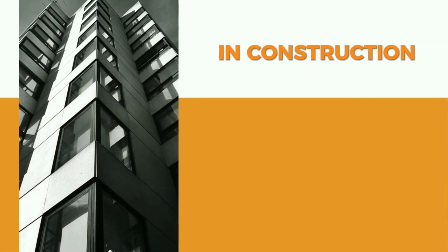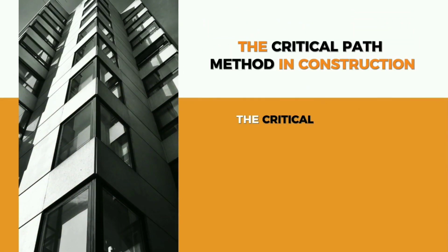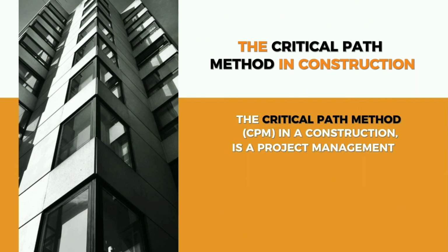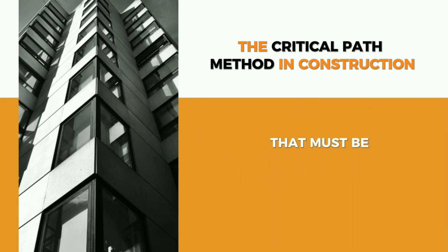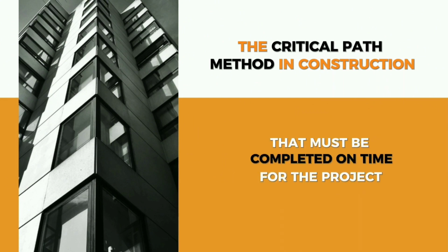The critical path method in construction. The critical path method (CPM) in construction is a project management technique that helps plan and schedule tasks, identifying the longest sequence of tasks in a project that must be completed on time for the project to meet its deadline.